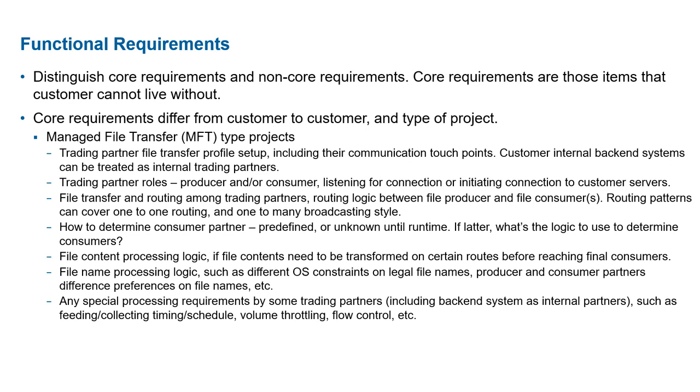Typically when I mention the core requirements, they are those without which the project cannot go live, right? Those are meant to be core requirements. Non-core requirements are requirements which are nice to have, or maybe something that we can consider after the project goes live in a phased manner, right? Those are not critical, or don't come in the path of your go live, right? Now, talking about core requirements, I've highlighted few of them.